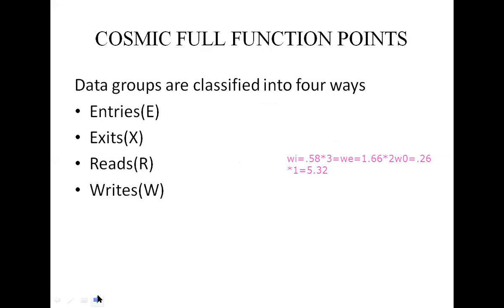The COSMIC model is very helpful in real-time and embedded applications. Here, inputs and outputs are aggregated into data groups. The data groups are classified in four ways: entries, exits, reads, and writes. These are the four ways.